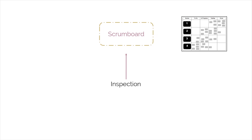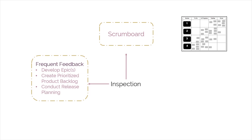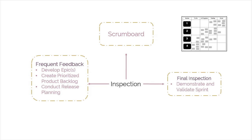The collection of feedback from the customer and other stakeholders during the Develop Epics, Create Prioritized Product Backlog, and Conduct Release Planning processes give additional opportunities for inspection. The final point of inspection comes during the Review Meeting, when the team seeks approval of the deliverables by the product owner and the customer in the Demonstrate and Validate Sprint process.